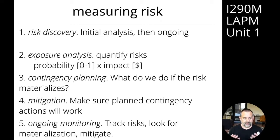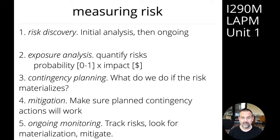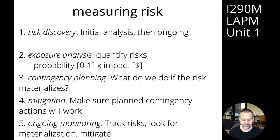Mitigation means making sure that the planned contingency actions will work. Then you have to do ongoing monitoring — you have to track those risks, look for materialization, and mitigate risks if they do actually materialize. You've also got to continue to discover new risks, because risks will definitely change over the life cycle of your product. So you've got to continue to find new ones and update your estimates and plans on an ongoing basis.